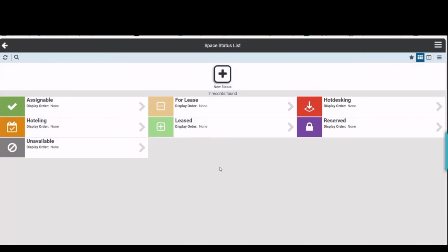And if that does not match what's on the floor plans, it can be a really big safety issue, especially depending upon who the fire system is keying off of. Is it keying off of space management or the architectural drawings? If those two aren't the same, people could get hurt, which is obviously the most important thing, but a school could also get in a lot of trouble if somebody's trying to get to a heart attack victim and can't find them because the room numbers don't match. That's a big deal.